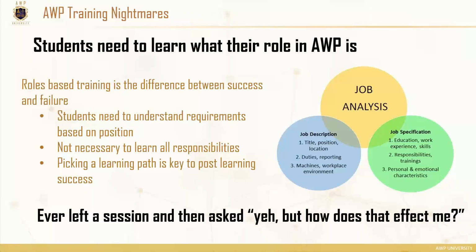Yeah, that's a great addition. And I think some of those soft skills in AWP are highly required to understand. We also teach soft skills for the craft and for the work phase planner, which, one thing I've noticed over the 15, 20 plus years that I've been involved in AWP is that work phase planners run a tightrope. And that tightrope is between control of the field and understanding the humility that they are actually building the plan and executing the plan of the foreman and general foreman, not vice versa. Understanding that they're in a pull type environment, not a push environment. And what I mean by that is that the craft is pulling the required information and asking for what they're going to do next versus being pushed down from the planners as to thou shalt execute this next kind of scenarios.